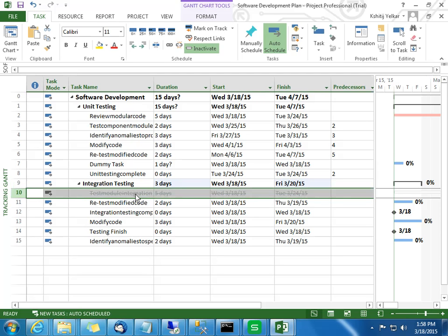Once it is inactive, it means it's not part of your project. It will be there, but only if you have to reuse it, then you can reuse it. Okay, but it will affect your project, in the sense that if you already added it in the project and put days and any link is there, then it will get deactivated. So obviously if there are total 5 days and one task is inactive, it will get reduced because it's linked to your summary task. Okay, so this way you can make your particular task inactive.